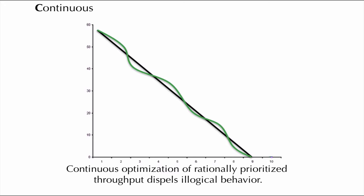This is an agile burndown chart. The horizontal axis represents time. The vertical represents delivery of valuable changes to system behavior. The green curve represents a team's progress in actually doing this. Because humans aren't very good at predicting the future, this green curve is wildly unrealistic. Teams often see something more like this blue one, discovering their progress isn't going to satisfy expectations raised by their initial estimates.